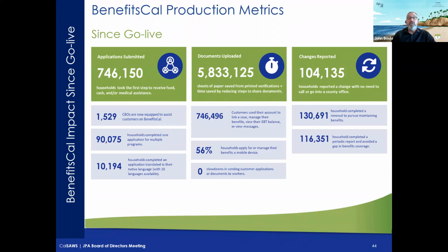What signing off on the holdback, signing off on final acceptance, means is that during the DD&I effort, we held back part of each deliverable payment until final acceptance. It would release that holdback payment to them, but it wouldn't do anything different to any of the warranties that we have on the code or the future enhancements that we have.